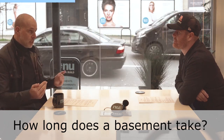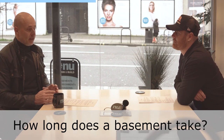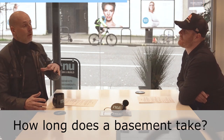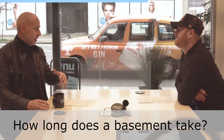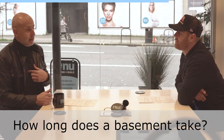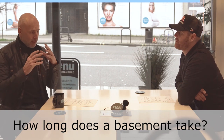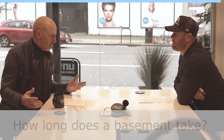Going back a few years, you could do double and triple basements, but Kensington and Chelsea, Hammersmith and Fulham, and Westminster can't stand it, because it takes so long and it's so messy and noisy. Now there's a policy in South Kensington that means you have to have a traffic management plan, which puts in place procedures to make sure your neighbours are looked after. If you're doing a triple basement next to me, that's 1.5 to 2 years of noise and mess, and when the grab lorries come along, they block up the road for half an hour at a time. In London, that's chaos.